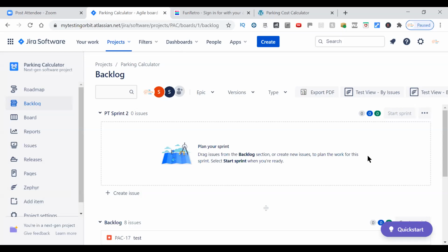Okay, so now over here sprint 1 has been completed. In sprint 2 you can see there is nothing, but we do have some backlog items. A new cycle will start on the coming Monday, and new things from the backlog will be moved into the next sprint as part of the sprint planning meeting, and then we can start the sprint, and that's how the cycle will keep on going for each sprint. So this is a view which I wanted to show you.